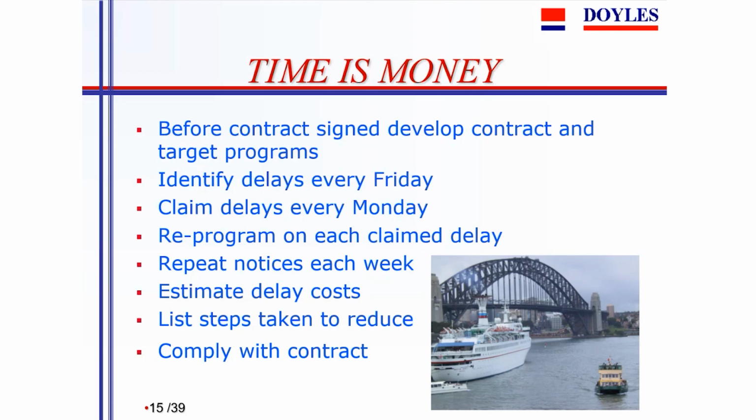So say, for instance, there's a price that removing water from the excavation will be priced at so much per 1,000 litres. Now, if he only withdraws 1,000 litres, you might have had to set up the pumps, set up the pipes, do all the work and only get 1,000 litres and a small amount of contribution.